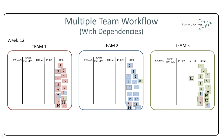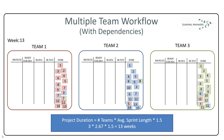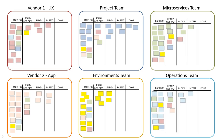You'll also see some multicolored cards, which are placeholders for work. The work gets done, but it takes longer. The project duration is likely to be the number of teams multiplied by their average sprint length multiplied by 1.5 — the 1.5 accounts for items not always being worked on in the next iteration, perhaps half going over into the following sprint. With three teams, if one is on a three-week cadence, the average sprint length would be 2.7, multiplied by that 1.5, showing how projects that could finish in seven weeks in isolation get delayed when dependencies exist between teams.